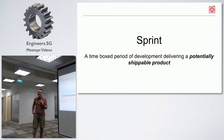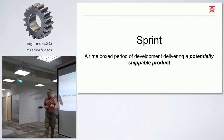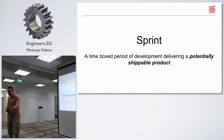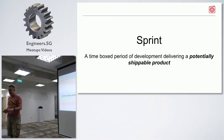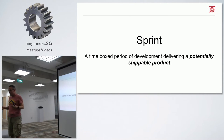What is a sprint? A sprint is a time-boxed period of development and delivery of a potentially shippable product. Time-boxed means it's a defined amount of time — every sprint the same length of time. When the clock is up, it's pencils down, like an exam. Potentially shippable product means whatever comes out the other side of a sprint, you should be able to ship. Doesn't mean you choose to ship it, but it means that it could be shipped. For marketing reasons, or because the support organization isn't ready, you may not choose to ship it — but you should be able to.